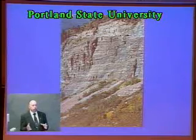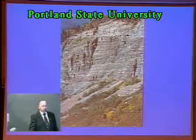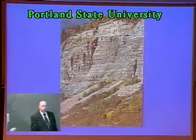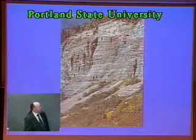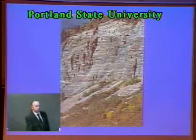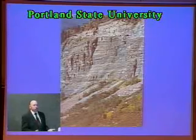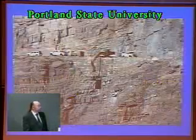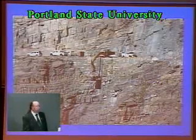And so you have to take that into account and make sure that you reconstruct the bridges or the retaining walls or whatever as close as possible as you can, trying to maintain that historic context for the roadway in any work you do. And like I mentioned before, in Glacier, it's mostly a repair kind of thing, and there's miles and miles of retaining walls in the park there. They were built obviously from the bottom up, but they tend to wear out from the bottom up as well, and so it gets pretty hairy trying to reconstruct and repair them, and a lot of times you have to do a top-down kind of thing to do that.